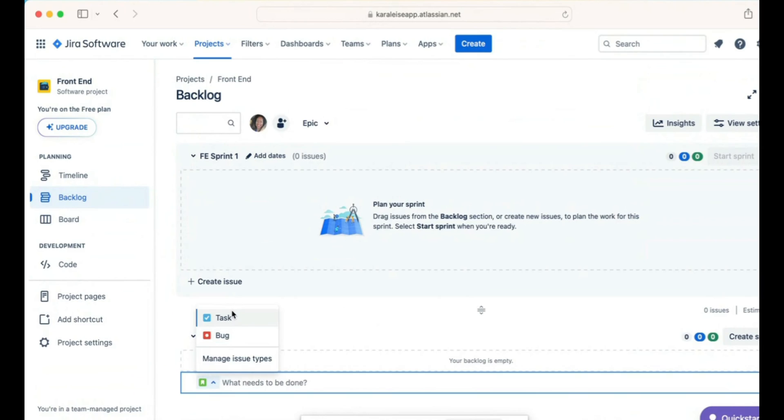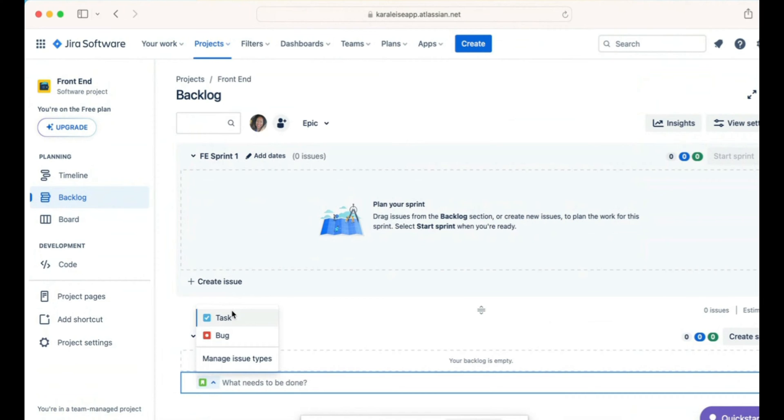What's the difference between a task and a story? The story is like a bigger holding space for all of what you're going to do. So you could have a story that breaks down into different tasks. Let's say you have a story and the story requires you to build this part of the UI first and do this other part of the UI and do this calculation. You could have one story and then break down the different steps of it into a task, or you could have it all as an acceptance criteria in the story. It's a little bit fuzzy as to when to use a story versus a task, but your team will help you decide that.